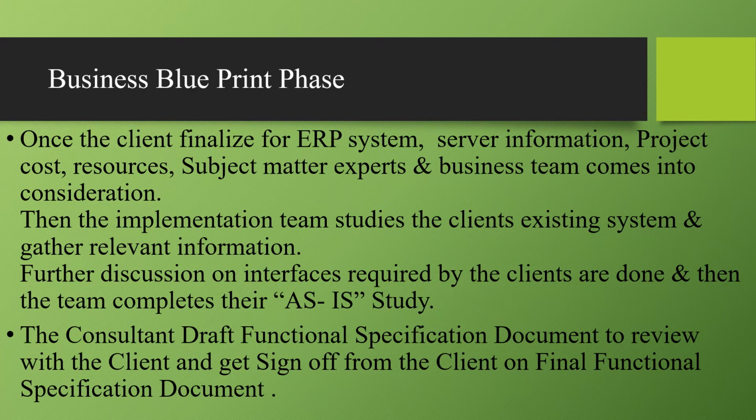So the implementation team will connect with the client team and try to understand the systems, what kind of processing they have, what systems they are using, and how the project is going on. They will also discuss the interfaces and complete a study of what they are actually doing as-is. If any changes are required, these are also discussed, and as per the discussion they will prepare a draft documentation.